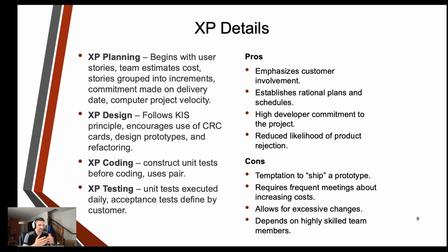There are a lot of estimates made around user stories to determine the effort required for implementation, and sometimes that can lead to planning fallacies around the idea of underestimating the amount of time and work it's going to take. But as long as these increments are shorter, the planning fallacy is usually not that strong because the amount of features being implemented is not as much.